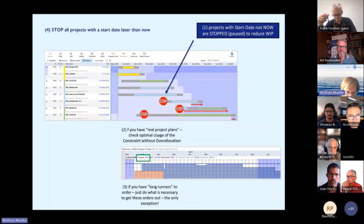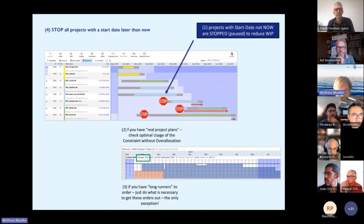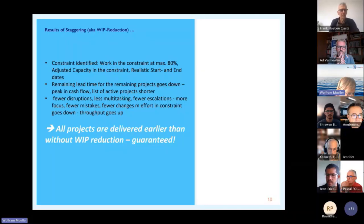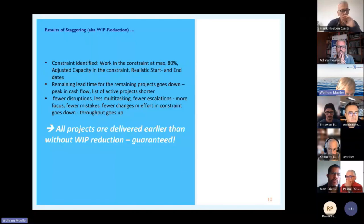That's the fastest way to reduce work in progress. You just have to ensure that on the paused projects no one is working anymore. Then they will run around looking for work — and of course you can ask them to help the active projects prepare better, which will increase the speed of those projects. I've seen even big companies do this within a few days: put all projects in a list, get an overview of the constraint, do the staggering, and prohibit work on everything not allowed.